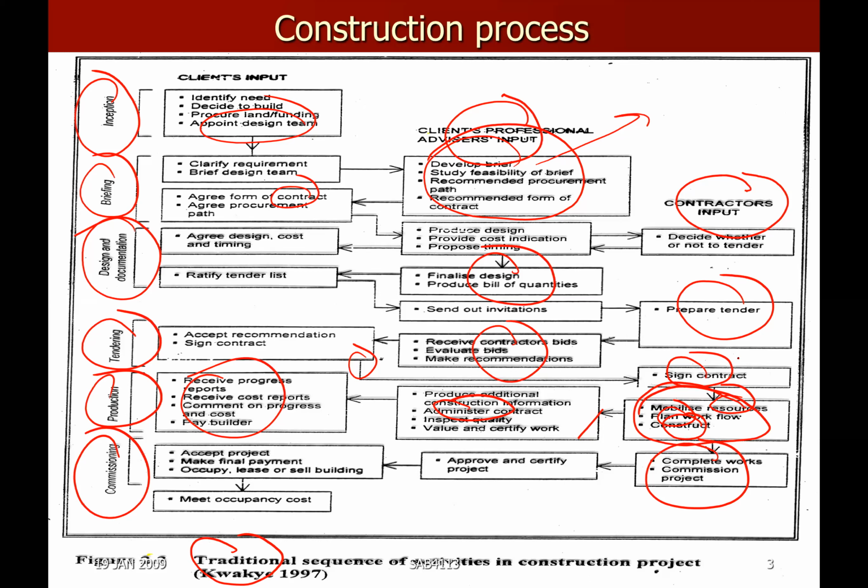representative of the client, and then accepted by the so-called owner or client. And this is also when the contractor will get perhaps the final payment on all the works done. But bear in mind, there is money being held by the client, such as the performance bond. Okay, performance bond, normally about 5% of the contract value will be held.